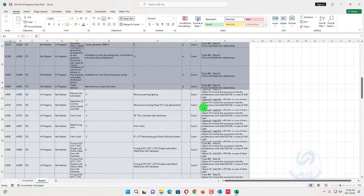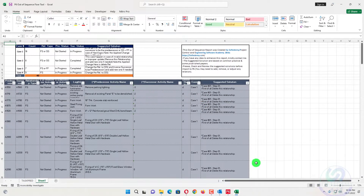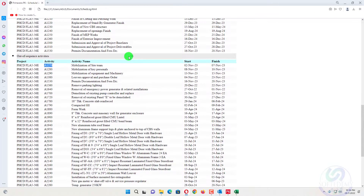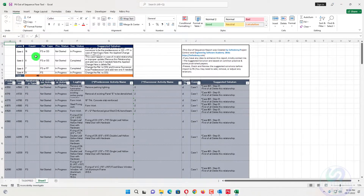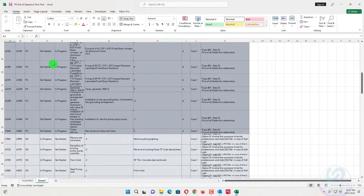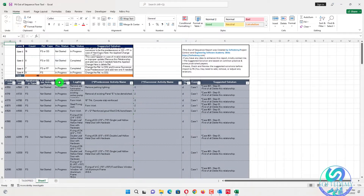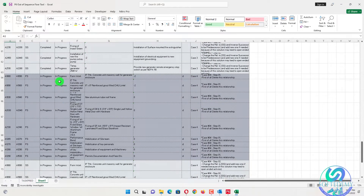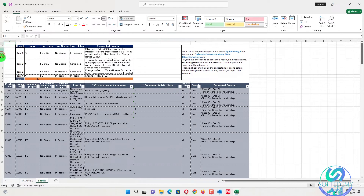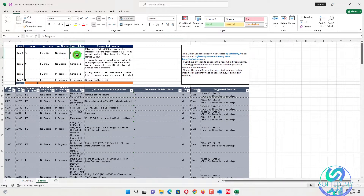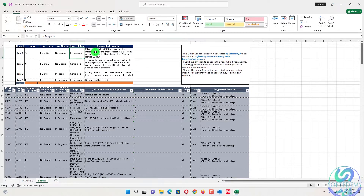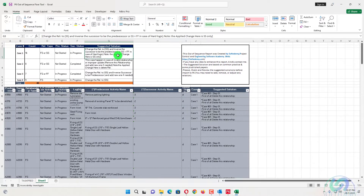When we press Yes, a lot of detail appears. Remember in the log there were 36 activities, but the tool is showing 40 — there may be some calculation difference, but we can resolve it. There are four types of cases. In Case 1, if your predecessor is not started and the successor is in progress, you will remove that relationship and change it to start-to-start. If the logic is soft, inverse the relationship and assign start-to-start and finish-to-finish.